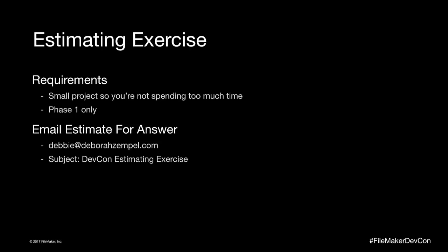Some people have a flat fee. They think, I don't want a project with someone who's not willing to pay me $5,000 for a storyboard. But I don't do that. For me, if it is just a $10,000 to $15,000 project, it's going to be a much smaller storyboard than a $100,000 project. So I adjust based on that.